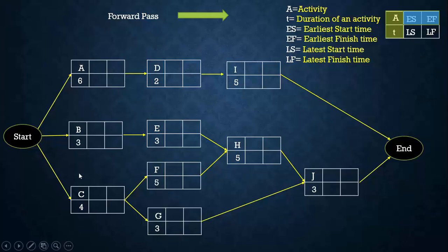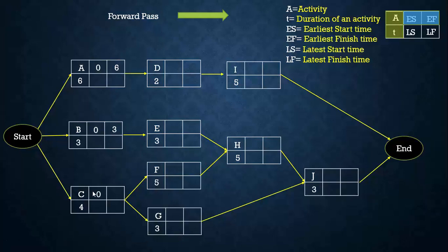Activities A, B, and C can be started simultaneously — they do not require any preceding activity, so they start on day 0. For activity A, earliest start time is 0 and earliest finish time is 0 plus 6, which is 6. For activity B, earliest start is 0 and earliest finish is 0 plus 3, which is 3. For activity C, earliest start is 0 and earliest finish is 0 plus 4, which is 4. For activity D, it needs A to complete, so its earliest start time is the earliest finish time of A, that is 6.